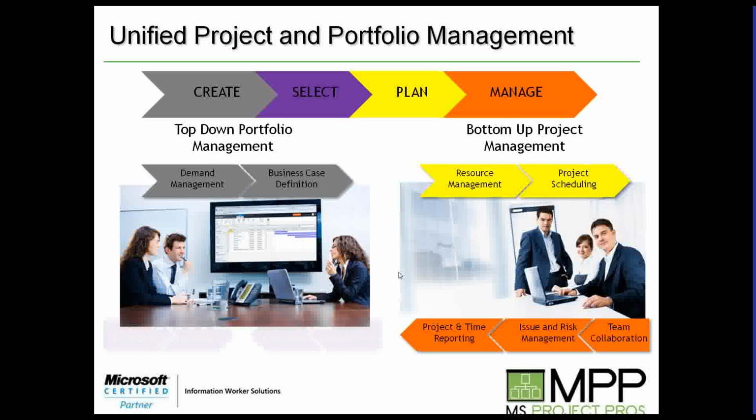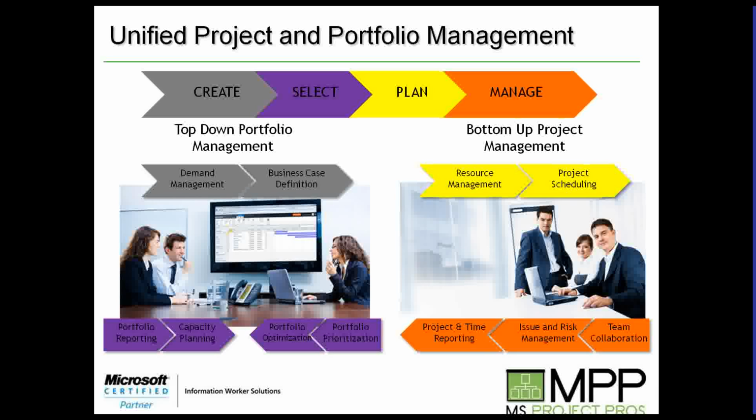From a portfolio perspective, right, of course we get the analytics, we get the optimization, we get the ability to go in there and say, well, if I've got this amount of a budget, can I do these projects? And based on the 20 projects that are in the system that I'm analyzing, which of those have the highest priority based on drivers that were pre-established, right, where at some point the organization went in and said, well, this is more important than this. It's more important that we're increasing the market share, right, than we are with keeping our customers happy. Well, of those projects that are increasing the market share, which ones are they, right?